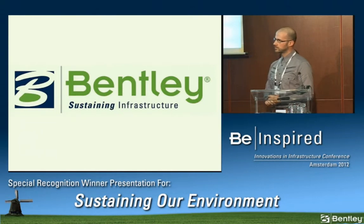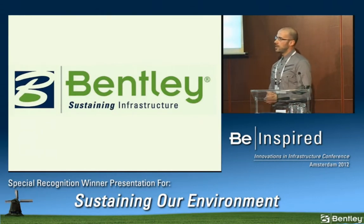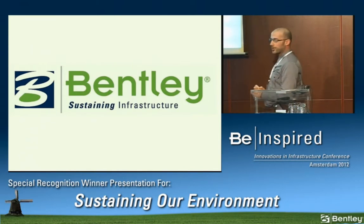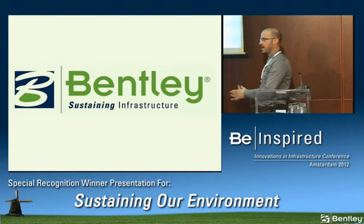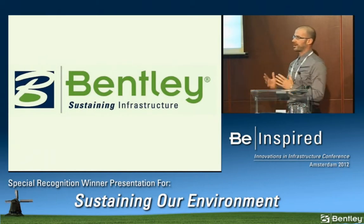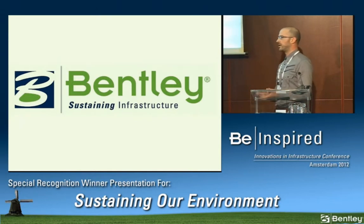So I have an associated question. How do you propagate and track changes? Many different ways. What we've struggled with is the design decision log as a separate entity outside of everything, right? So what we're trying to do is pull the design decision log in as part of a commenting piece of metadata on components themselves. So we've been exploring various tools.